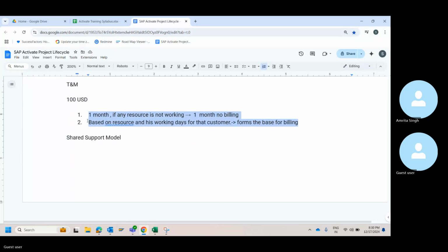I will need an integration consultant also. But that integration consultant need not be sitting with me for 1 month. I need not waste the billing for that person because the workload will be only 30-40 hours per month. I need not give 160 hours of timesheet to that person. Similarly, if they have a few assets to maintain, they're asking for a plant maintenance person, asset management module. That person also need not be there for the entire month, only 30-40 hours we are going to use.